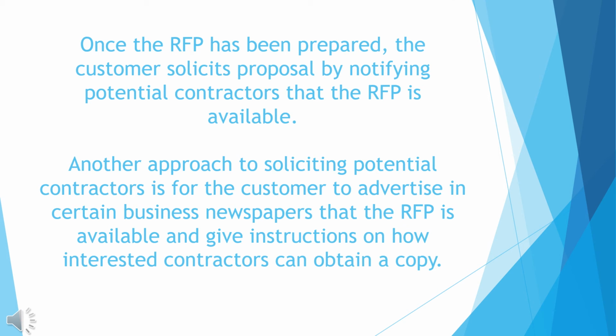Once the RFP has been prepared, the customer solicits proposals by notifying potential contractors that the RFP is available. Another approach to soliciting potential contractors is for the customer to advertise in certain business newspapers that the RFP is available and give instructions on how interested contractors can obtain a copy.